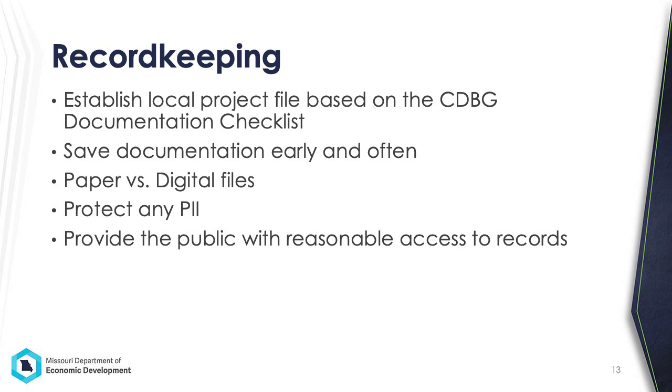The subrecipient does have the option of paper or digital record retention, as long as all records are available for monitoring and accessible to the public. If a subrecipient does choose the digital route, please make sure that they're still keeping the paper originals of any items with wet signatures and protecting any personally identifiable information such as social security numbers or beneficiary addresses.